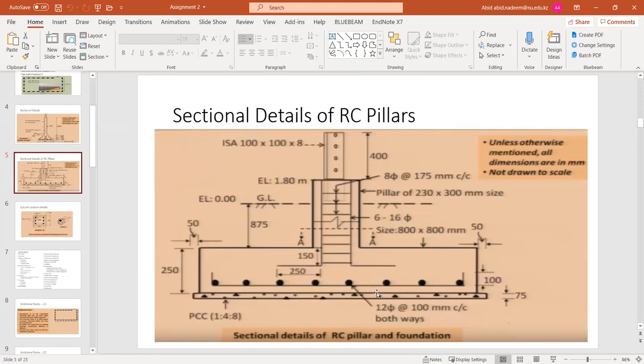So for example, in this case, what is going to happen is that you will place the reinforcement for the footing and the column for the whole section. And then you will place the formwork. So formwork will include four sides of the footing. Formwork will also include four sides of the column. And then these formworks have to be fixed. Of course, nowadays steel formwork is provided, and this steel formwork has its own supports to be placed on the site, and then that formwork can be placed. So once the formwork for both the footing and the column has been placed, what will be the next activity?